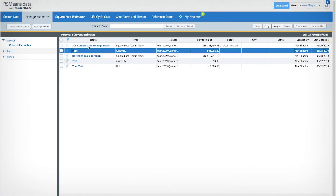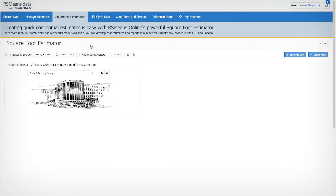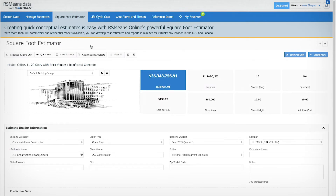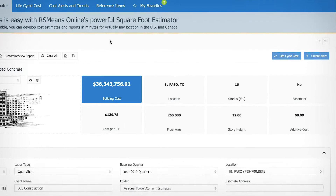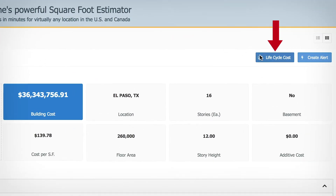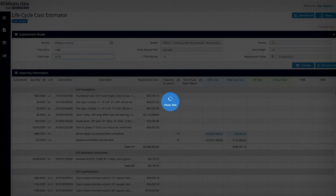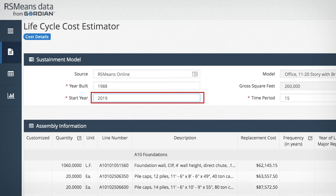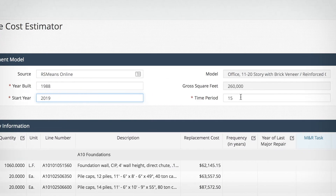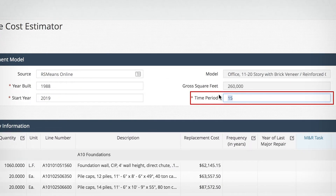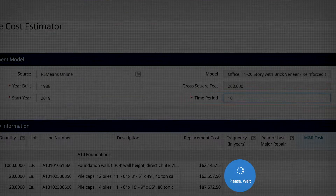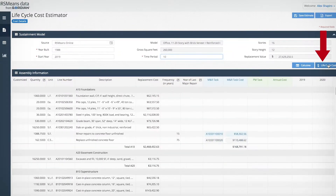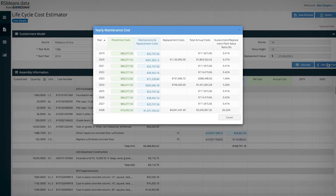Choose an existing square foot or assembly estimate. From here, click the Life Cycle Cost button to go to the Life Cycle Cost Estimator. Change the start year to when you want to start your estimate and enter a time period — let's do ten years. Now click the Life Cycle Cost button.